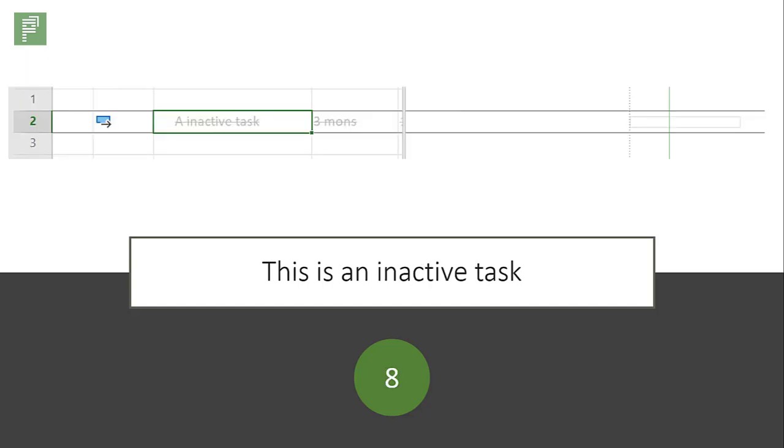This is an inactive task. No actual action is going to happen here. Work costs and duration aren't part of the schedule anymore.